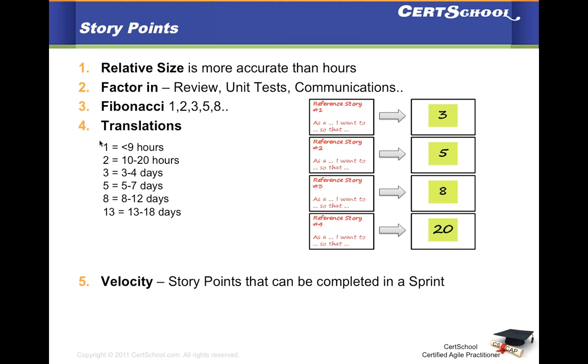That remaining time you're tracking against an absolute unit. As you continue working on a story, your remaining time starts reducing, and if you keep a close tab on it using burn down charts, or any other custom tool, you can keep a very close tab on whether that estimate is accurate or not, even from the relative terms. So the relative sizing we are using at the very beginning, where you're trying to give the most accurate estimate, and as you're going through the iteration, working on the story, the remaining time, you are using the absolute. I hope that answers that question.